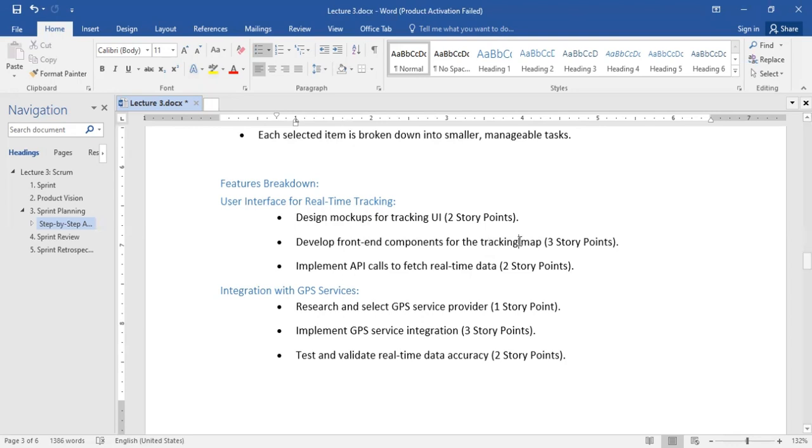In recurring costs, how much will that rub off in terms of development? Now, in this case, they are building on an existing infrastructure, so they're not building from scratch. So technically, they are going to be using API calls. So you have 3 story points. The developer says, okay, based on what we want to build, it's going to take us 3 story points, which is 3 days to create it.